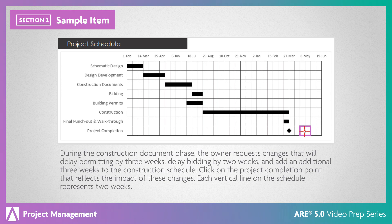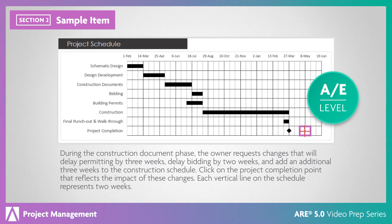Delays to permitting will cause other items to be delayed, and the overall schedule will need to be adjusted. The delays to bidding and permitting are concurrent, so they push back the start of construction by three weeks. The construction timeline must be extended by an additional three weeks. The new completion date will be six weeks later. This is an AE-level item because it requires you to analyze the impact of each of the delays and determine their effect on the overall project completion.